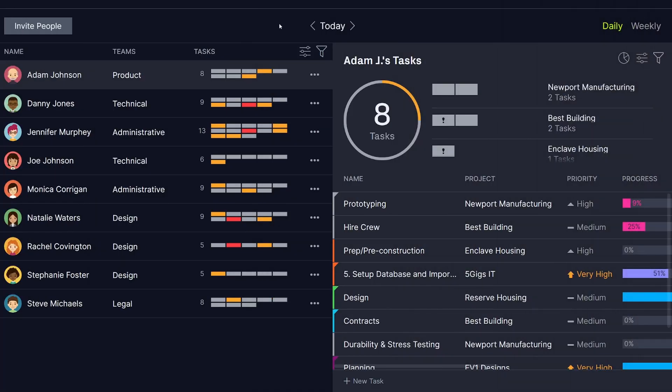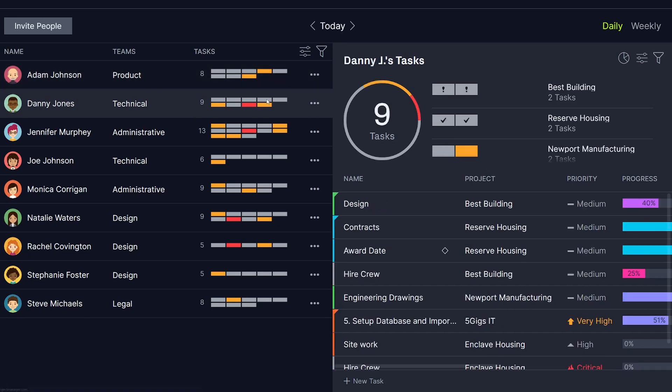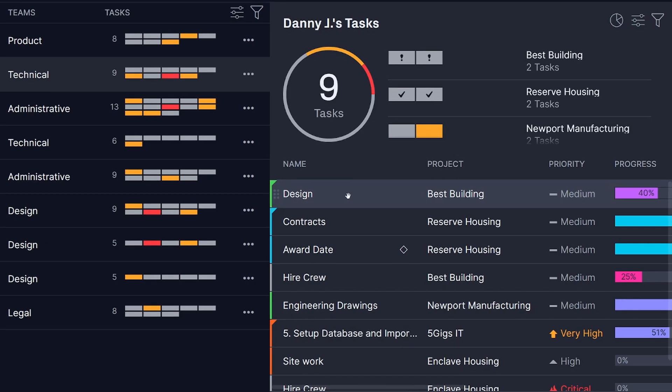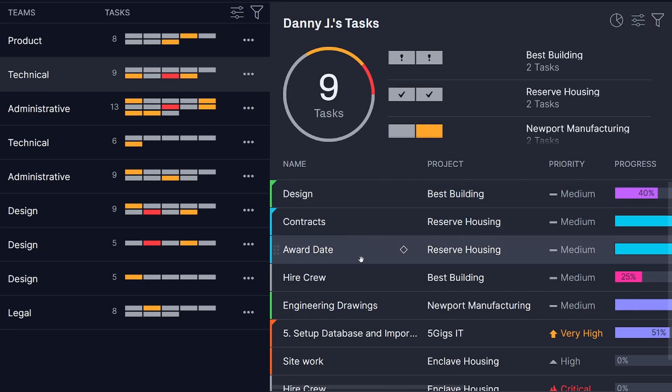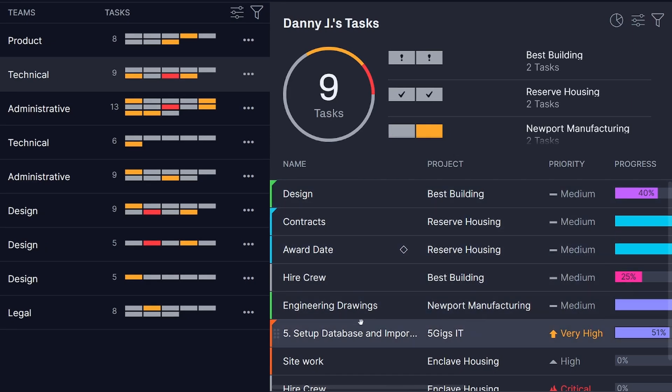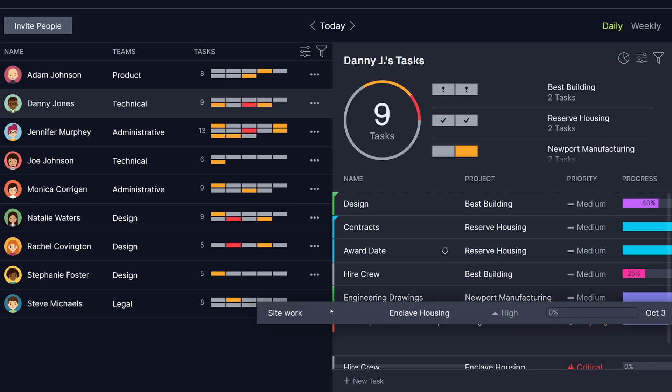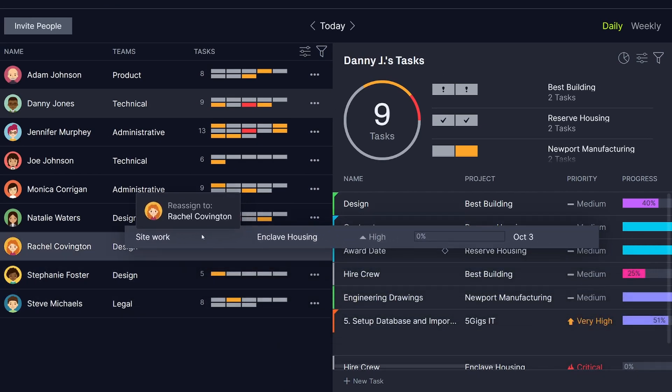Assigning the right tasks to each team member is easy with Project Manager's resource tools. To see what your team is working on this week, use the team section. Here you can see everyone's tasks laid out, along with their progress and due dates. You can even reassign tasks with a drag-and-drop.